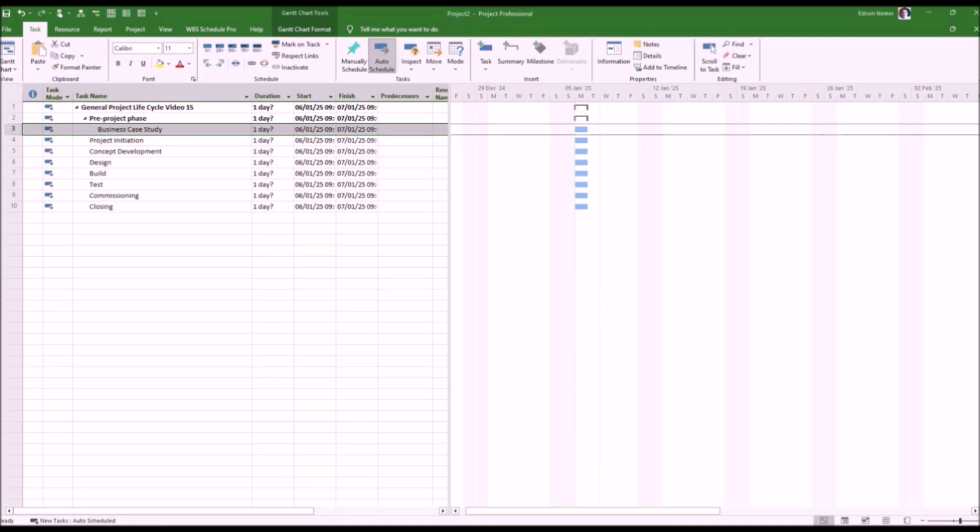It is developed during the early stages of a project and should include 1. The identified problem and the proposed solution. 2. The expected benefits. 3. The associated costs. 4. The risks involved. 5. The return on investment.